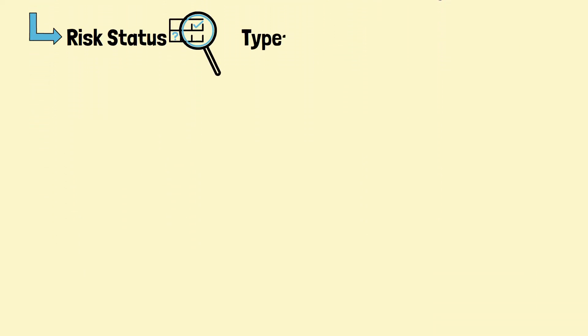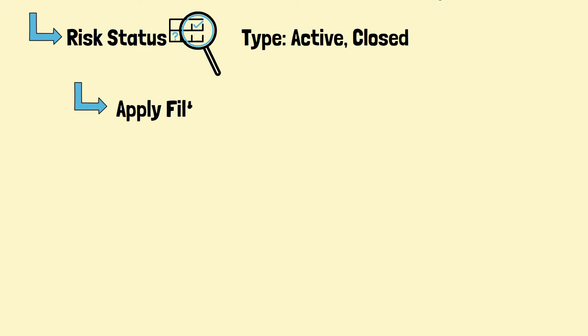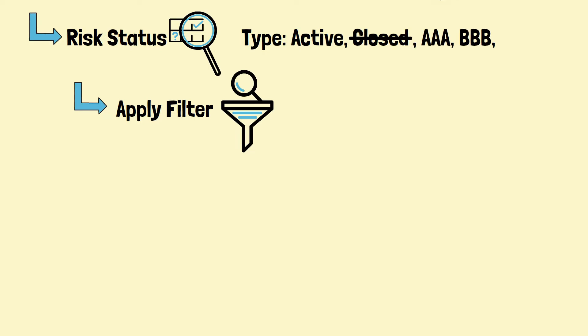Risk status is required. You can tag it as active or closed. The team can use a filter to hide the closed risks and work on the active ones. If you need more categories of risk status, you have the freedom to add. For example, if you want to filter out the risks that you will accept without any risk response, you can add an accept risk status.